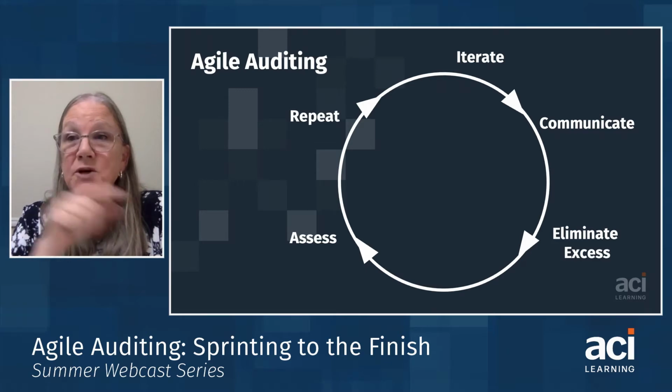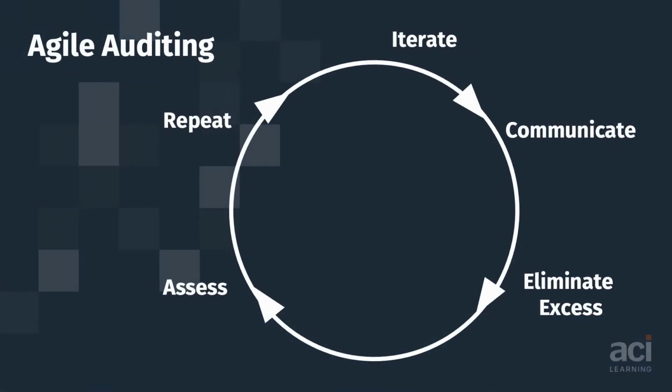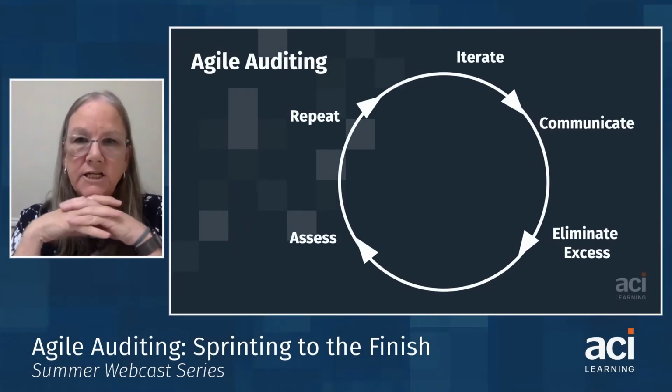There are things like initial research, which auditors who are not familiar with Agile auditing would recognize: standard operating procedures, guides, best practices, policies, procedures, all of the normal research that auditors are accustomed to doing. Then it dovetails a little bit. The next stage in planning is going to be mini current state workshops and walkthroughs, what's called a Gemba walk. If you're looking at the graphic here, this actually precedes the iteration. All of this work, all of this discussion helps us. We'll have our normal risk assessment procedures that we do. We'll draft some control objectives with the client. And then we start thinking about the program itself and what each iteration might be able to accomplish.